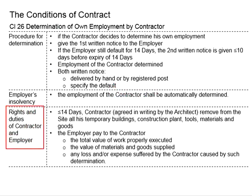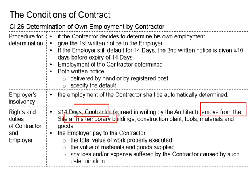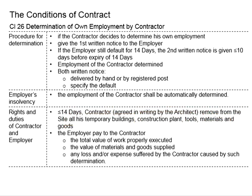The following are the rights and duties of the contractor and employer after determination. Within 14 days, the contractor will need to remove from the site all temporary buildings, construction plant, tools, materials, and goods. The removal of these items needs to be agreed by the architect and should be well documented in writing, so that the relevant agreement is traceable and can serve as evidence in case of any dispute. Now the contractor has determined himself from the project and the employer is at default.